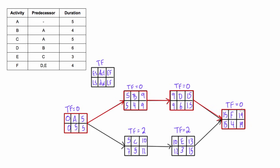Now we want to figure out the free float for each activity. Free float is the amount of time you can delay any activity without delaying the earliest starts of any succeeding activities. Notice that doesn't mention anything about the final end date or the duration of the project — it only refers to the earliest start of any succeeding activity. That's an important difference.